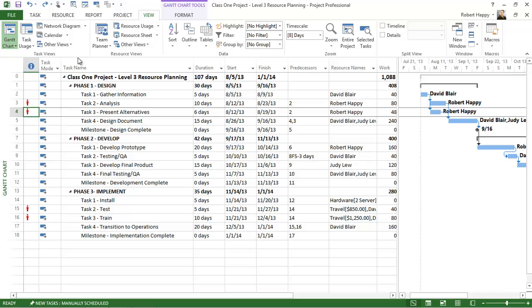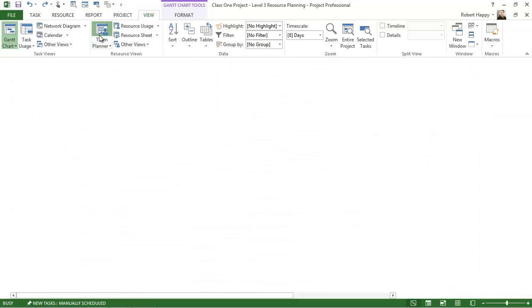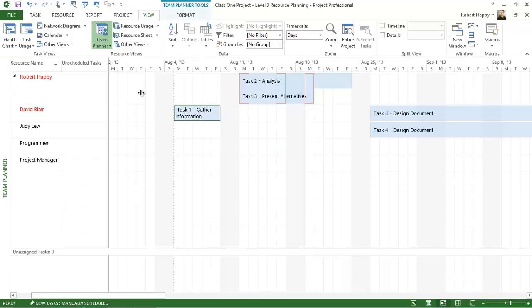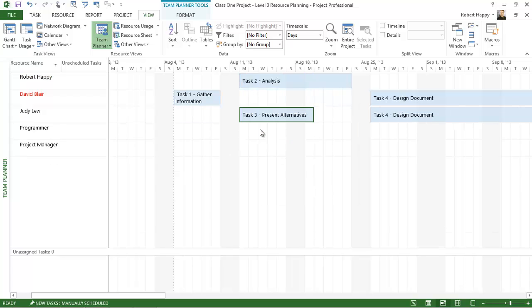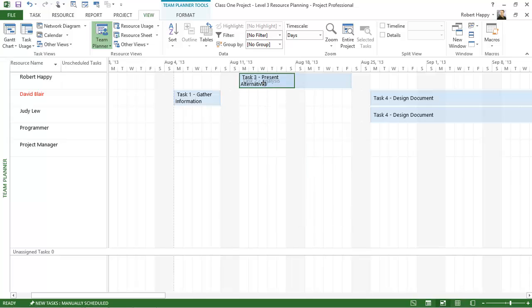I like to go to the Team Planner view, and here you can see that Robert's been overallocated, and there are things that you can do here. You can click and drag that task down to another resource, and that will resolve the resource conflict.